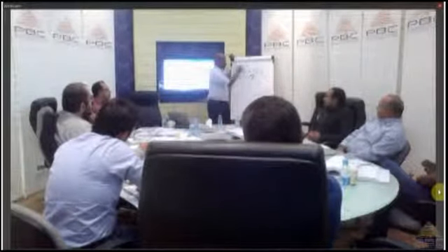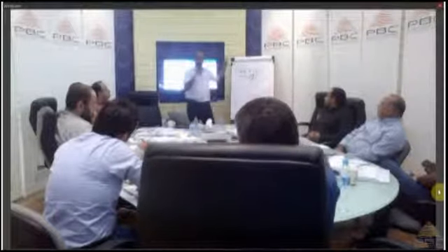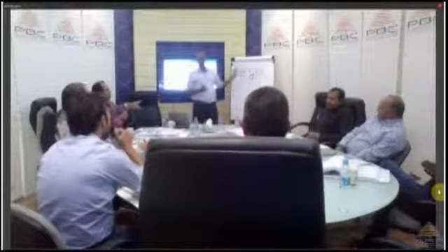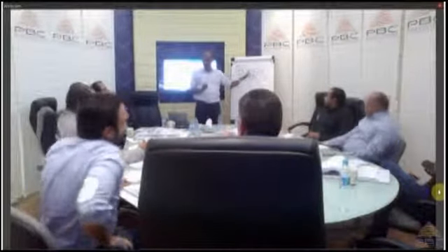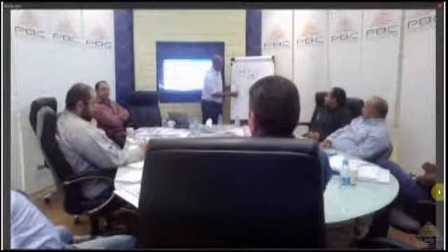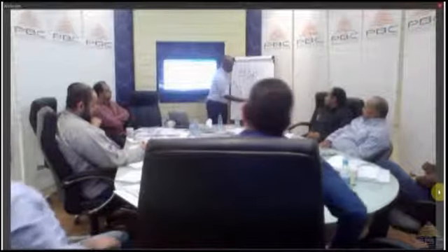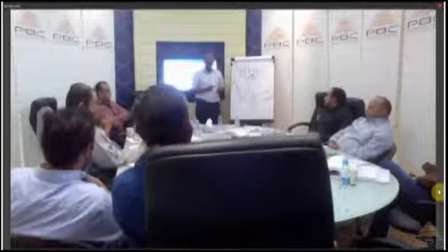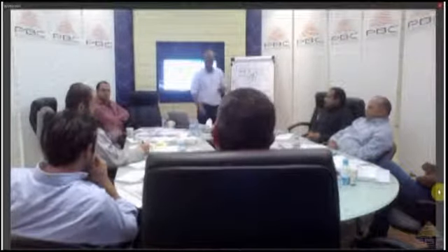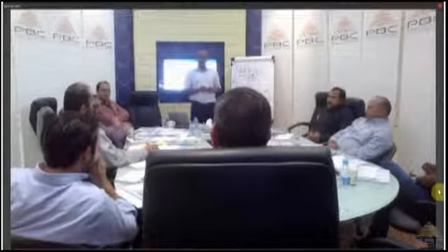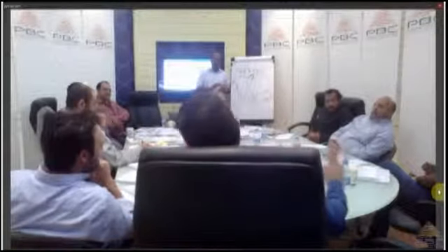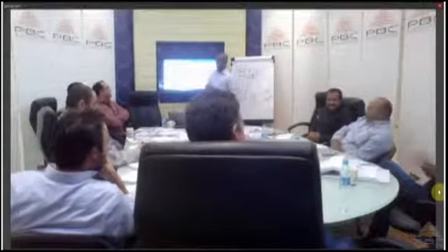So first we do QA during execution. They both have procedures, but QA happens during execution, and QC happens during monitoring. Before you install a tile, you have to specify the tiles. You have to be sure you purchase the right product. Then the quality control will come in the execution. So these procedures will be in my quality management plan.